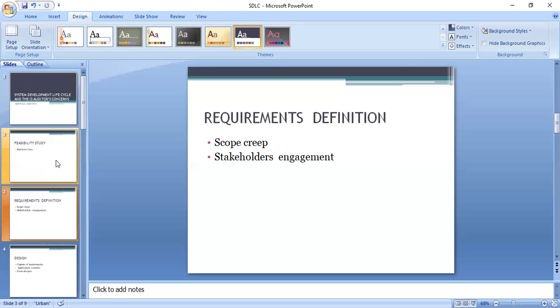All right. If this is not done, what is called scope creep is what is going to happen. So scope creep means that requirements are changing in the middle of the project. So maybe we have already passed requirement definition, we have moved to design, or we have moved to development, or we have even moved to the live environment before somebody is now realizing, oh, there is this particular module that we forgot to tell you, and that could be very, very discouraging. And definitely it will mean more time lost. It will mean more financial commitment for the organization.